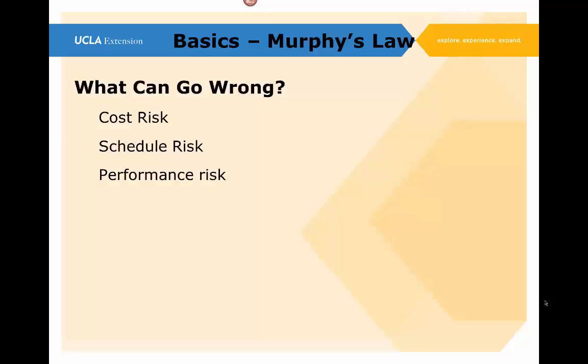A schedule risk. What's a schedule risk? Well, a schedule risk could be we have made arrangements for some subject matter experts from another department to join the project, and we need the tasks that they're going to be working on to start in 5 weeks or 6 weeks, a certain time. And we've made arrangements with the department manager, and we know who the people are going to be, and we got commitments for them.